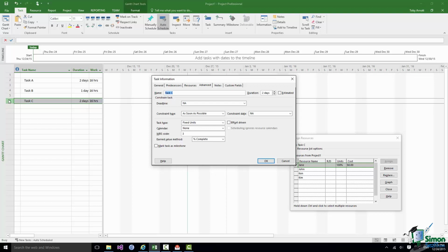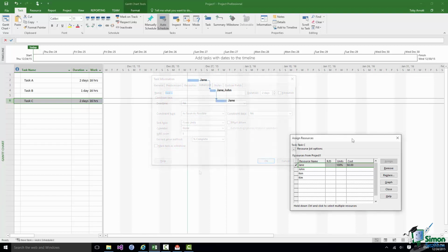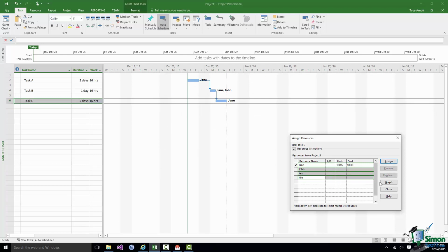And if I put more resources onto a task, then all that will happen is that more work gets done. And as a task that's not effort driven, if I assign additional resource, let's go to town this time, let's assign 3 more resources. What is going to happen as I assign a total of 4 people is that we're just getting a lot more work done on that task. Now as usual you've got the warning sign on the left there and you can choose a different option, but basically we're getting the default, which is increase the amount of work but keep the same duration.